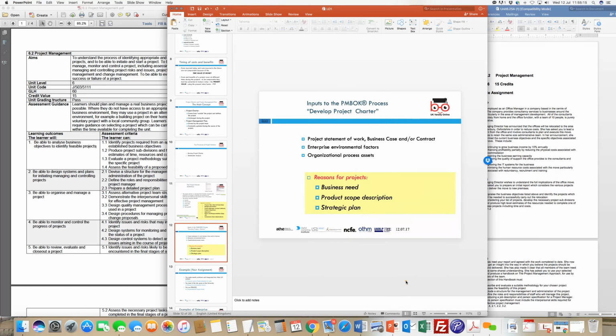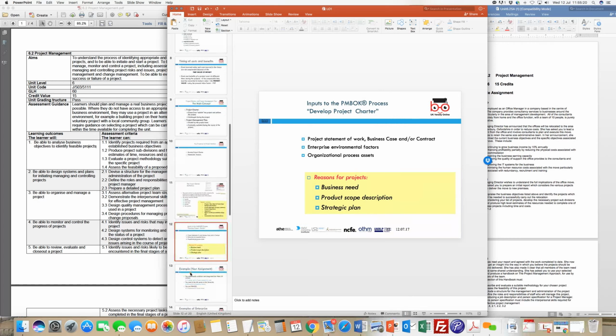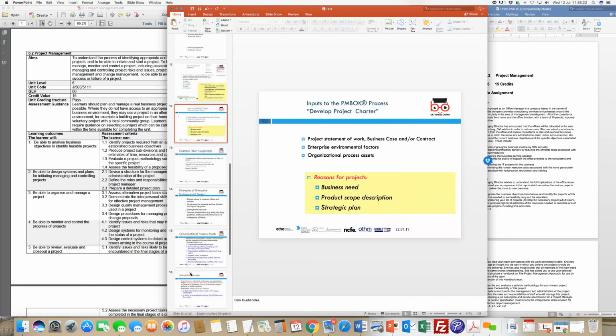Okay. The other bits that we will look at would be to understand the factors which affect the project. Things like environmental factors, things like risks. If you're a developer, like the example I gave you earlier, you have to look at working capital management as far as the development of the site for houses is concerned. So banks would want to see progress happening before they release more funds for you to be able to deploy to build more houses.